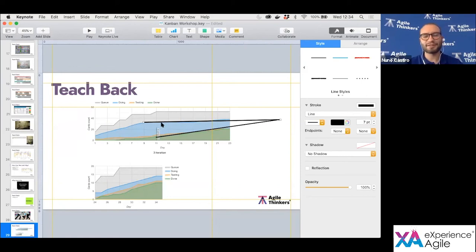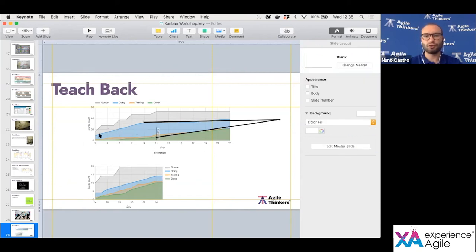Exactly, some assumptions. What happened to this team is here, they had no WIP limits, they had a lot of tasks, they were just starting things, managing resources because, okay, if you are free, if something is blocked, you can start doing something new, and they were just throwing things into doing, until there was a point where they decided to manage the flow. They said, okay, no, there's a WIP limit. We can only have five things in progress. If an impediment comes in, we'll have to deal with it. And automatically they started delivering more work, more things started getting done, and they got more predictable, okay?